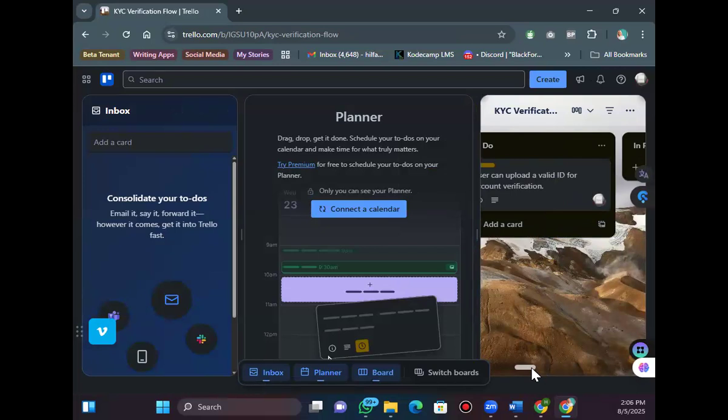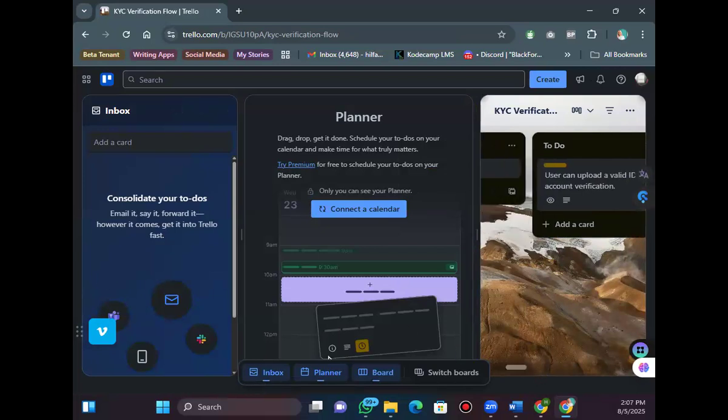Once you move a task forward, you basically just drag and drop the card from your backlog to do, and then eventually to in progress, and then Q&A, and then done, and so on. The movement of cards basically tells you what stage the task is in, right? This is what we call a Kanban style workflow. It gives you a visual of how the work is flowing.